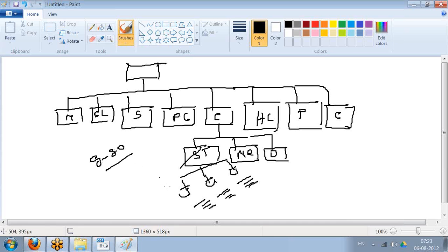So that means the work packages, this lowest level, should not be less than 8 hours. It should be around 8 hours, even for a small project. The idea is that at least once in a day you'll go and see the status of it. Don't break it further. Breaking it further will happen while preparing the schedule. So this is an intermediate step before your scope and schedule. From the scope you create a WBS, and from the WBS you derive the schedule.